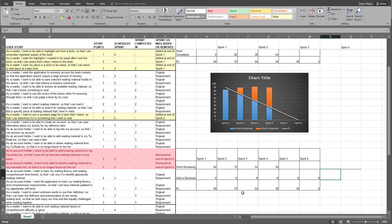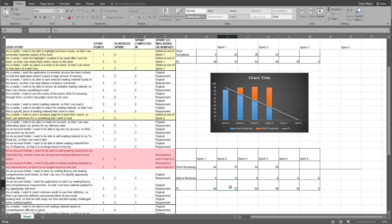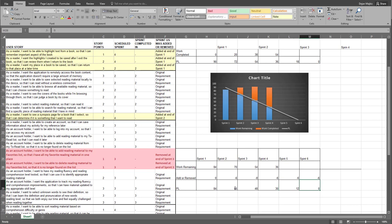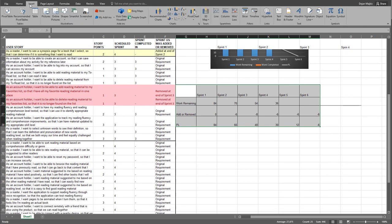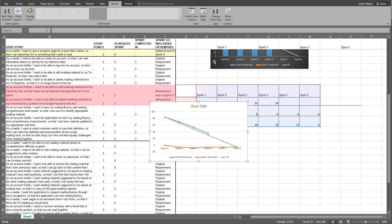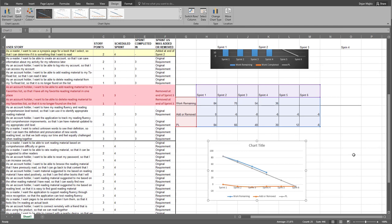One more thing we need to correct is the prediction line. In this case, the prediction line will start with 84 as the most current sprint. Minus 18 is 66, minus 18 is 48, 48 minus 18 is 30, 30 minus 18 is 12, and 12 minus 18 is minus six. Then we select all this data, go to Insert, choose Line with Markers, and this is the adjustable floor burndown chart.